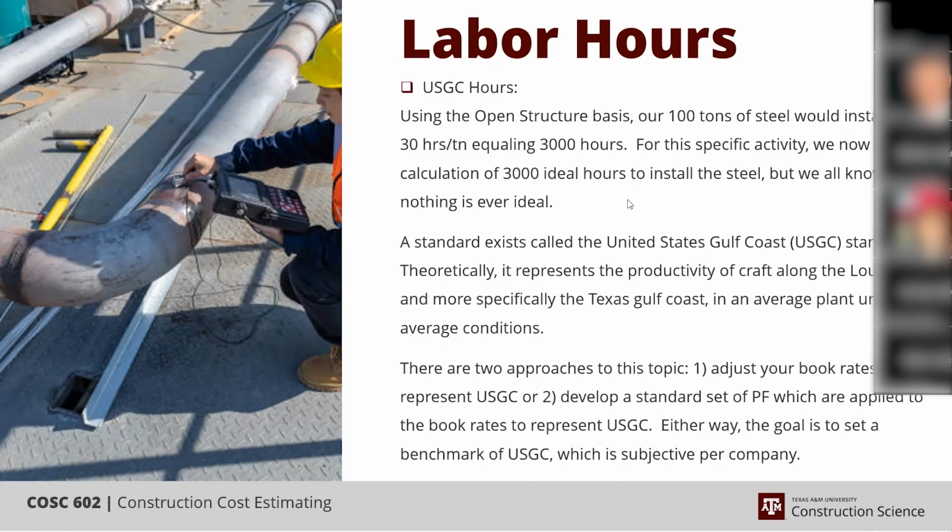But by understanding what your U.S. Gulf Coast standard is, then when you apply those rates to every project you ever build, theoretically, those projects should be on equal footing, and you could analyze the difference in the projects, apples to apples, that way.